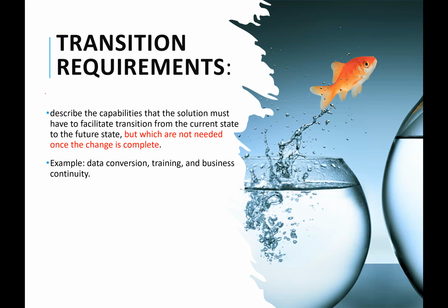Then you have transition requirements. This is one people forget a lot. Transition requirements essentially describe temporary requirements. So requirements to facilitate transition from current state to future state, but that will not be needed once that transition is complete. That's a transition requirement. So any requirement that you need to move from your current state to the future state, but that won't be needed after you have gotten the future state, is a transition requirement.